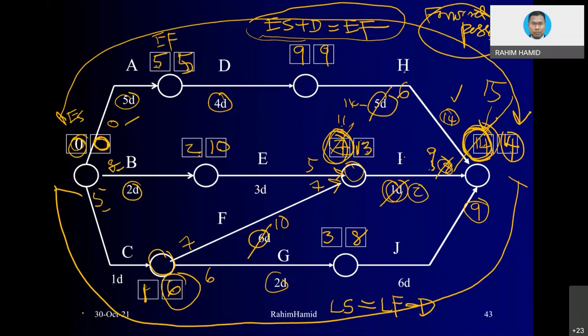So that's why we wanted to know the critical path, because the critical path means total float is 0, meaning those activities don't have free time. You cannot adjust, it basically gets stuck there. So anything that happens to that particular activity will affect the project completion date. So that's why we wanted to know those things.